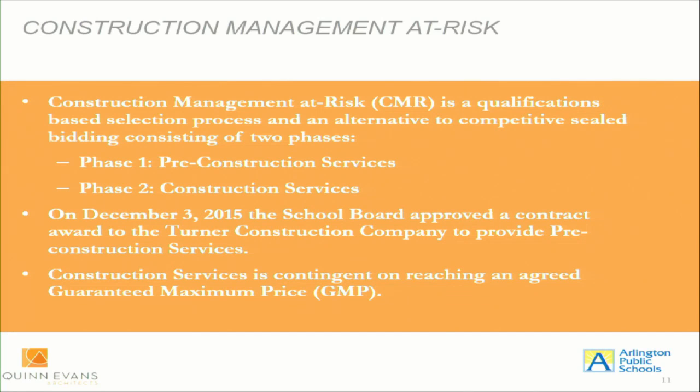So these next several slides may sound familiar. We went through something very similar for the Fleet Elementary School and the Wilson School when you heard those two projects in January. So just like those, we are a CM at risk delivery method. So part one of that was to do pre-construction services that was awarded to Turner Construction Company back in December of 2015.